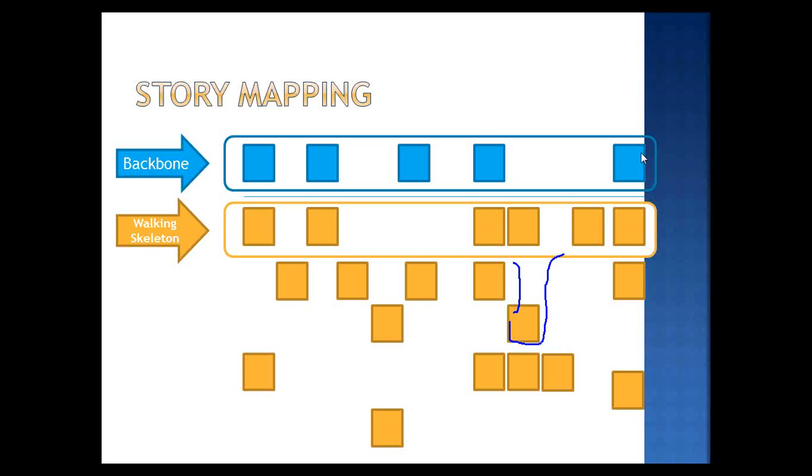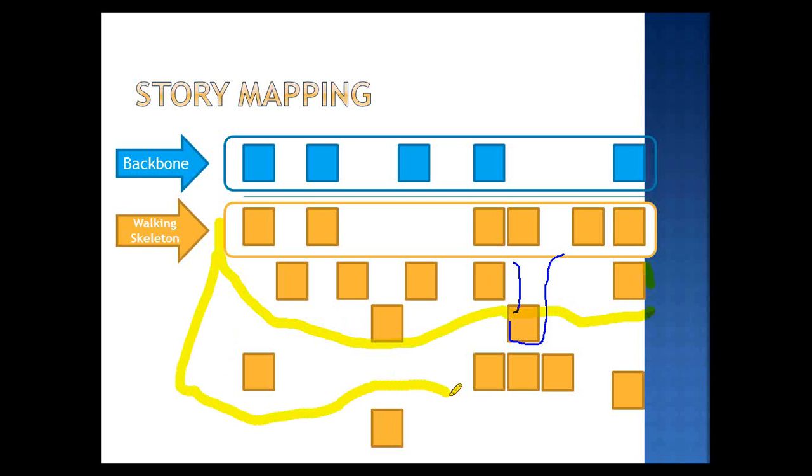All right. So that's kind of what I wanted to share with you today, was the idea of story mapping and personas, and then this. And I wish I had a picture of it, but I didn't put a picture of this in. This then goes on your wall. And these stories can be used in your release planning process. So this becomes your release 1. Then maybe go like this and say this is release 2, right? And then this is release 3.